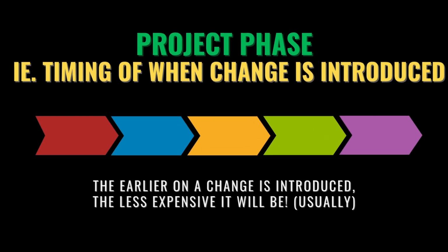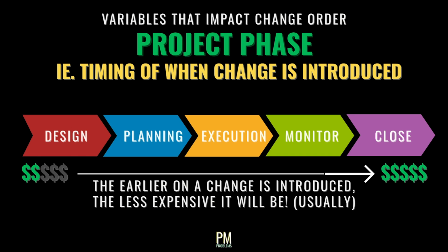Now that we've covered the common types of change orders we're likely to encounter, let's talk about a few variables in our projects that affect how much a change order is worth and what the terms and conditions need to be. The phase that a project is in when a change is introduced can have an effect on how much that change order will cost. Changes that take place before a project starts are usually a lot easier to address when compared to that same change happening after the project is underway.